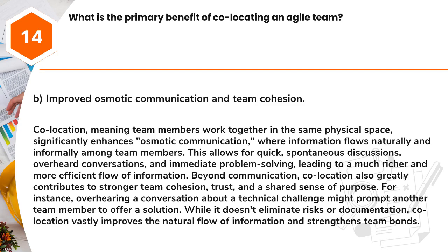Answer: B. Improved osmotic communication and team cohesion. Co-location, meaning team members work together in the same physical space, significantly enhances osmotic communication, where information flows naturally and informally among team members. This allows for quick, spontaneous discussions, overheard conversations, and immediate problem solving, leading to a much richer and more efficient flow of information.